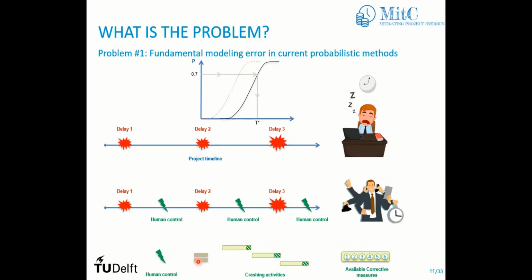So for example, if you are paving a road as part of your project, you could imagine a certain duration, and your capacity which you are allocating to this duration is, for example, 2 asphalt sets. Of course, at a certain time, you know that you have maybe to crash this activity, like Omar is calling this, and basically it means you can allocate an extra asphalt set.